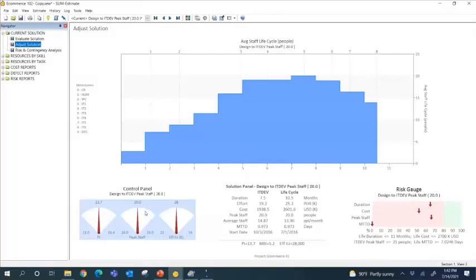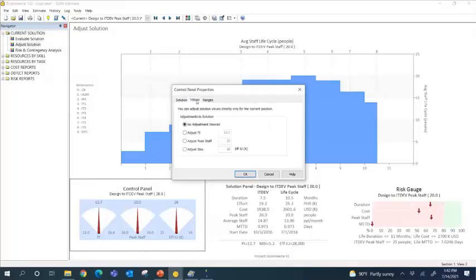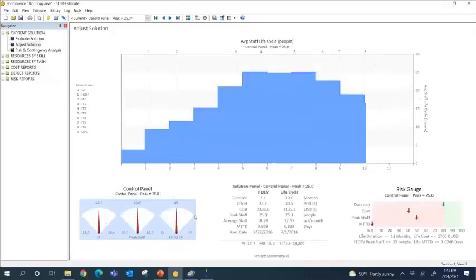And if I'm doing this in a spreadsheet and I don't have Slim, that could be a problem, because if I'm doing an estimate in a spreadsheet, those tend to be very linear, right? So what I'd rather do in this situation is use Slim, because it's based on the historical data that we've been talking about. And I could say, okay, great. Will it help me to add people? What if I add 5 people? How much more will that cost, and how much longer, and will that shorten the schedule? Now, if I had run this in a spreadsheet and I run the estimate, there you go, 25 people, right? It's going to save me a little bit of time, maybe 2 weeks.